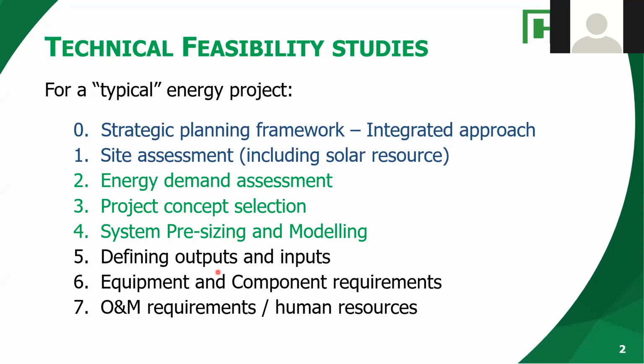Then we can define the outputs, the inputs, the bill of quantities, the budgets, etc. And finally, we take a decision to go ahead with a project. That's when we select and eventually launch the purchase, procurement for the equipments, components, and of course the operation and management aspects of our project.